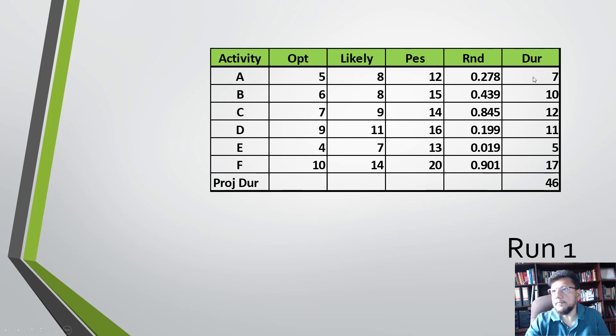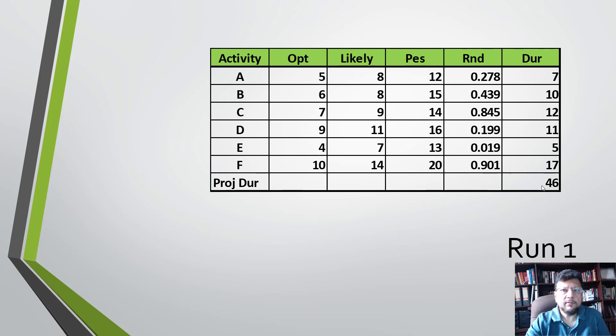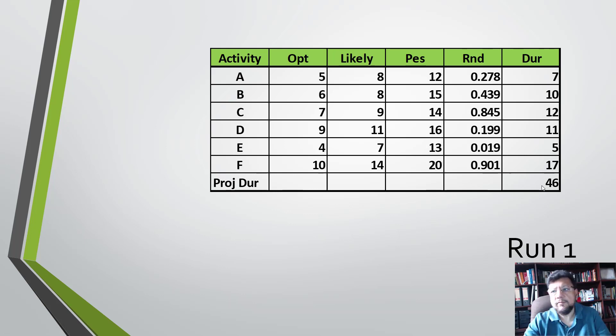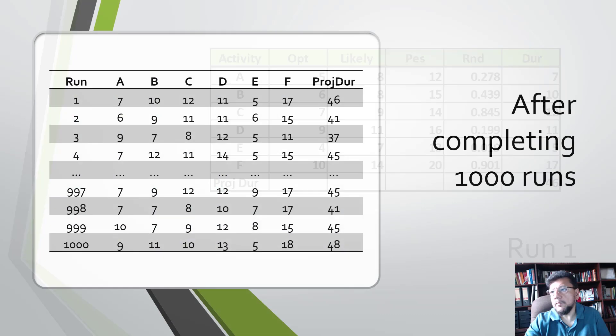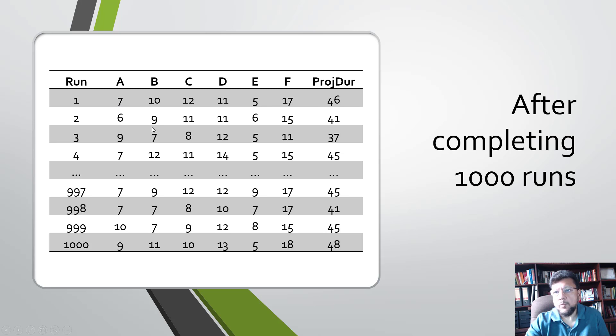You see here that the duration for A randomly in this round is 7, B is 10, C is 12, and so forth. At the end, we've computed a total project schedule duration of 46 days. This is run number one. You repeat the same run, and you can see that the first one was 46, and then keep going till we have 1000 runs.